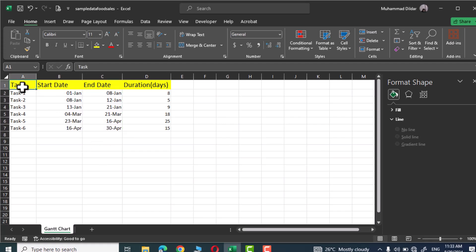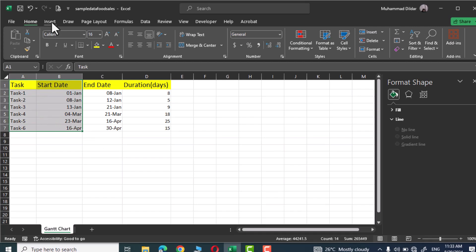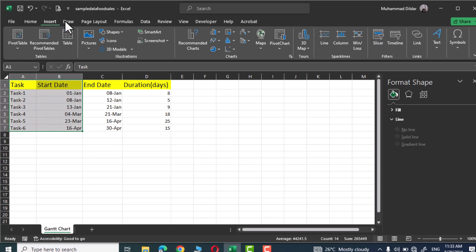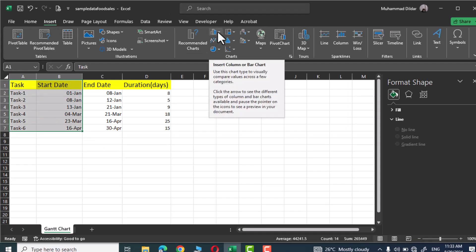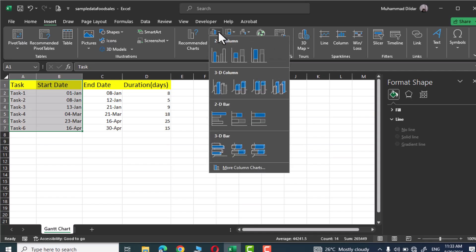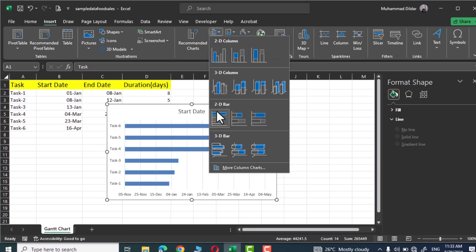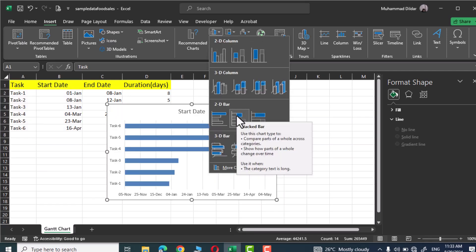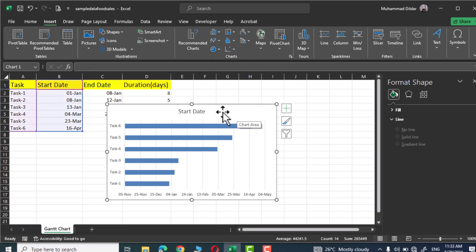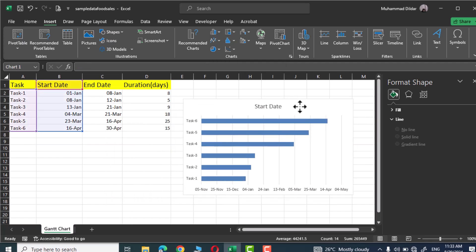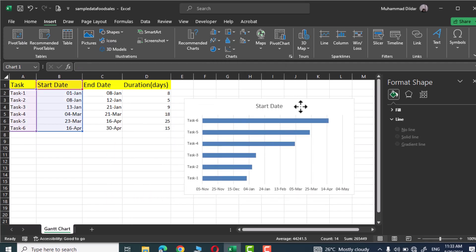Next we are going to select the task and the start date, go to Insert tab, in charts group simply select this column or bar chart, 2D bar chart, and this stacked bar chart. Click and there we have our chart like this.